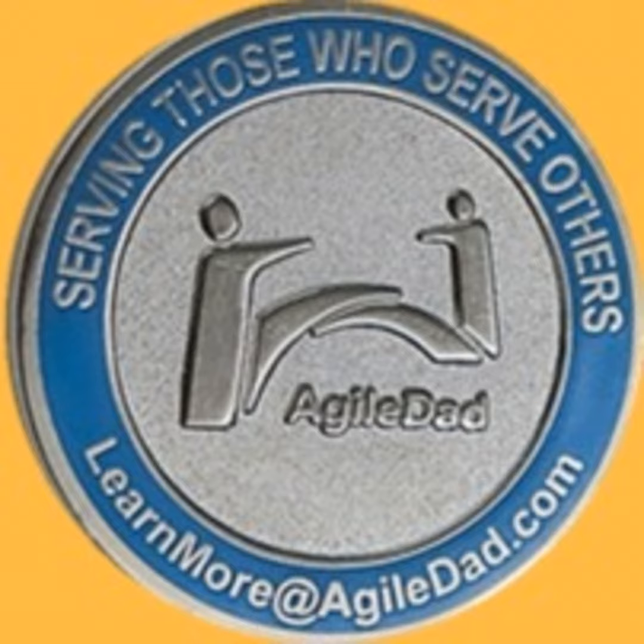The next one of the artifacts I would like to discuss is the sprint backlog. Now, the sprint backlog is almost the exact opposite of the product backlog in the sense that the sprint backlog is the connection to the team. This is the backlog that the team maintains with all the granular tasks and all the things that they need to do in order to build a specific product increment. So the sprint backlog is usually just one sprint in length, a couple of weeks, if you're doing 2-week sprints.